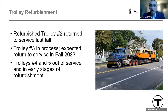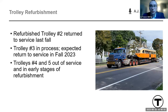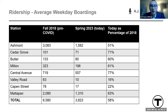I want to give a quick update on the trolley refurbishment project. The intent of the trolley refurbishment program is to improve passenger experience and reliability for the Mattapan Line right now while the transformation program design process occurs — these two programs are happening in parallel. As of today, two refurbished trolleys are back on the Mattapan Line. The third trolley is expected to return to service this fall. At peak service, there are four trolleys operating on the line at any given time. We're looking forward to having the fourth trolley return to service sometime next year, so all four active trolleys will be refurbished and become the primary vehicles for the line.